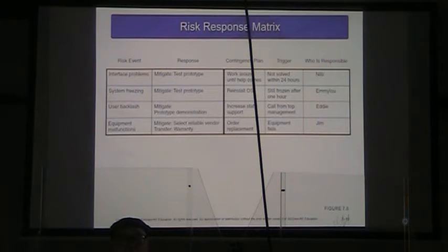User backlash, we're going to mitigate by having a prototype demonstration. If that risk comes about, we're going to increase the staff support, and our trigger is a call from top management. And Eddie is going to be responsible for that.